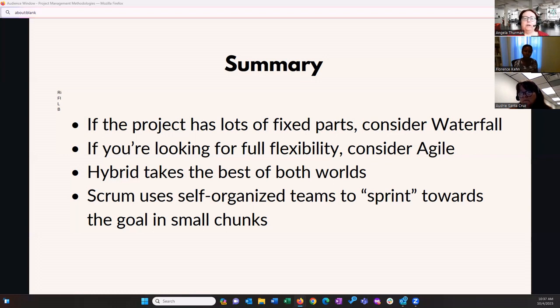As I mentioned, when you initiate a project in waterfall, one of the first things you're going to do is create a project charter, and that charter would lay out the purpose of the project, who is the sponsor, what the budget of the project is, what the overall requirements are, and basically the sponsor has to sign the charter, and it is the authorization for the project manager to actually assume responsibility for the project and receive that funding.